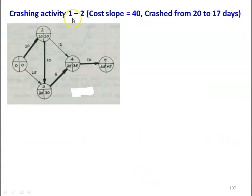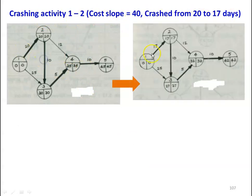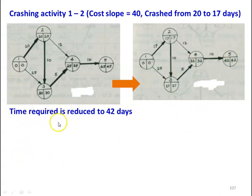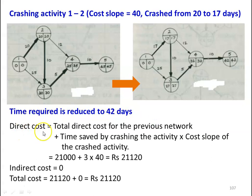First, activity 1-2 is crashed with cost slope 40, from 20 days to 17 days. The project duration is reduced from 45 days to 42 days. The critical path remains 1-2, 2-3, 3-4, and 4-5 with no change. Direct cost = 21,000 plus (3 days saved × 40) = 21,120. With no indirect cost, total cost equals 21,120.